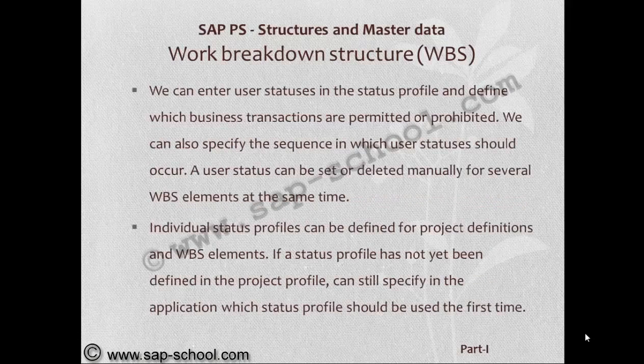of project system. We can enter user status in the status profile and define which business transactions are permitted or prohibited. We can also specify the sequence in which user status should occur. A user status can be set or deleted manually for several WBS elements at the same time. Individual status profiles can be defined for project definitions and WBS elements.